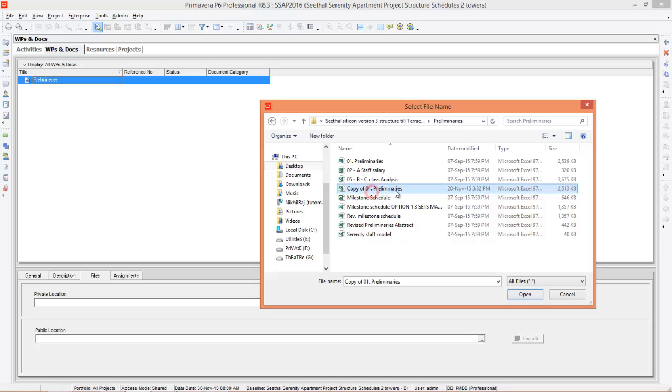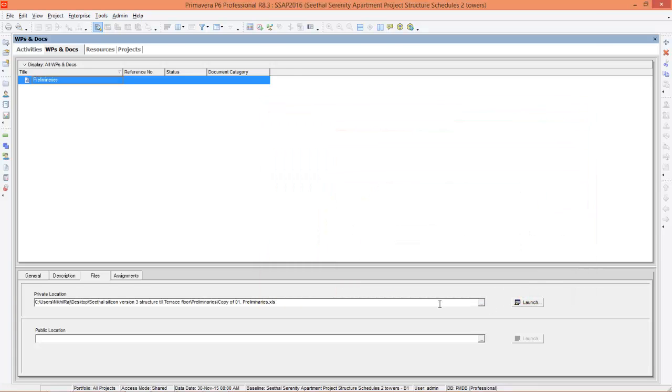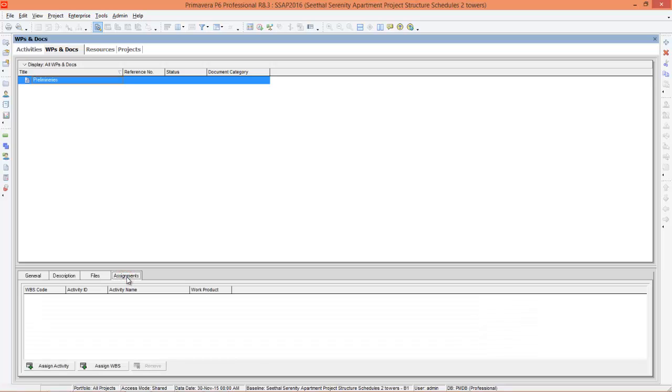Here is copy of preliminaries. Open it. This file I have selected. Now I need to assign this file to the project. Go to assignment. You can assign to activity or you can assign to WBS. I'm going to assign to WBS.